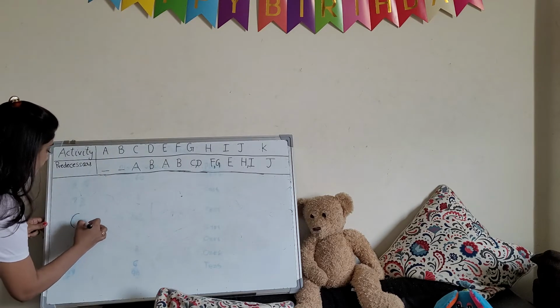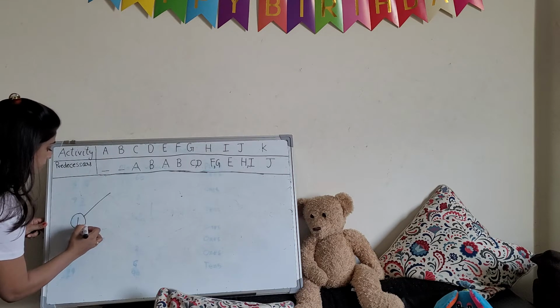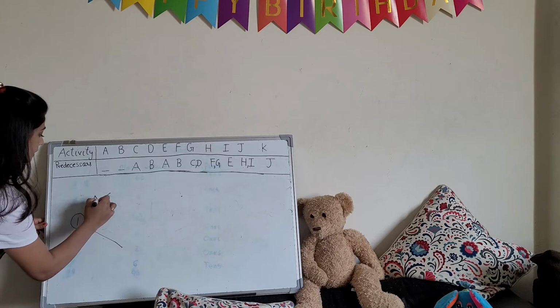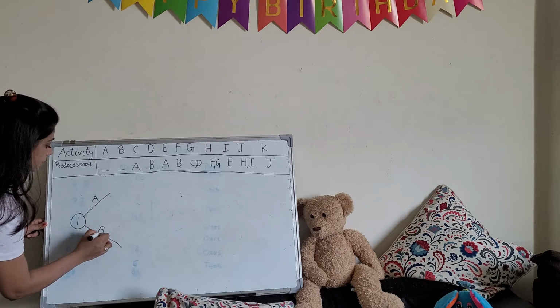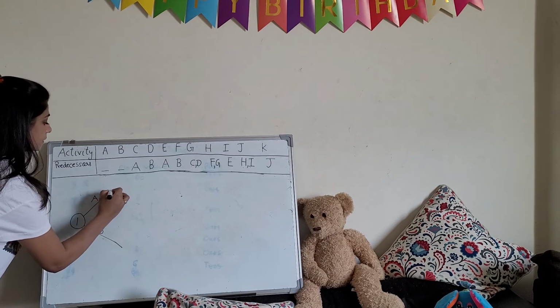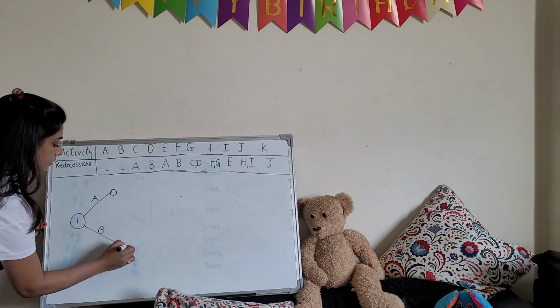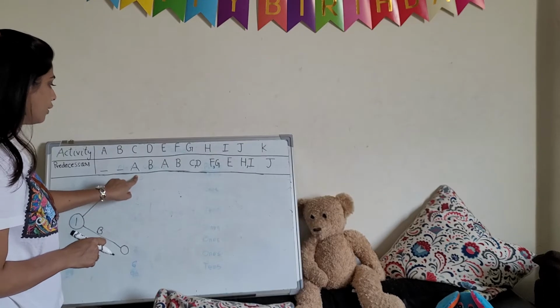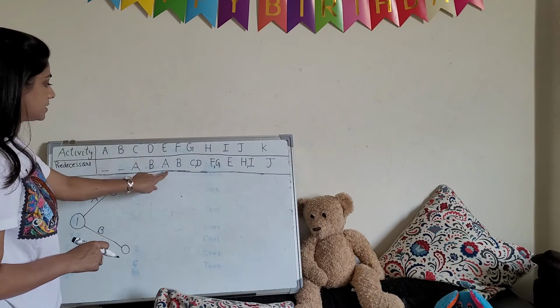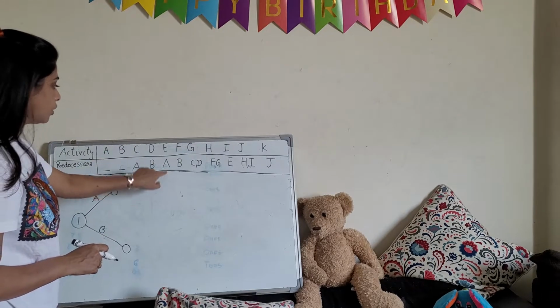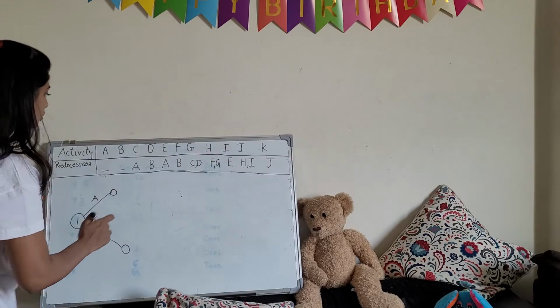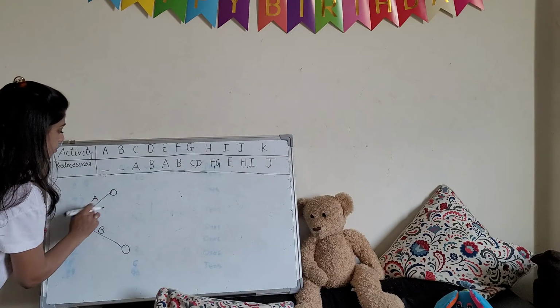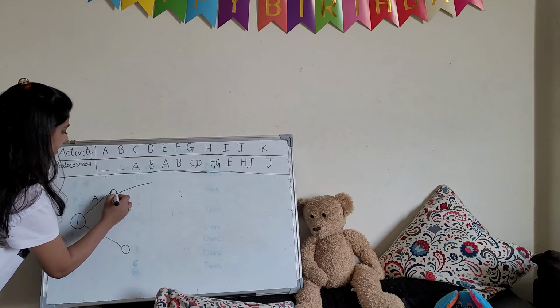So A and B, these are the first activity. Now here we can see A is the predecessor of activity C, and here also A is the predecessor of activity E. So A is here, so we will draw E and C.